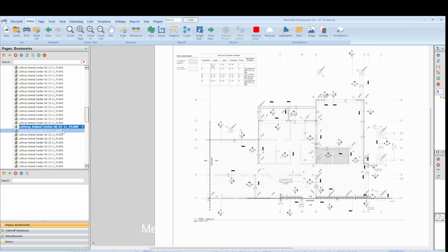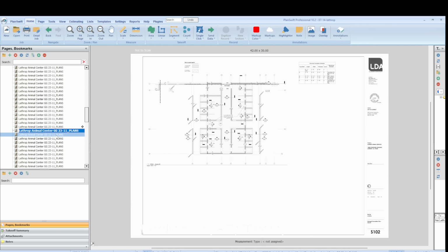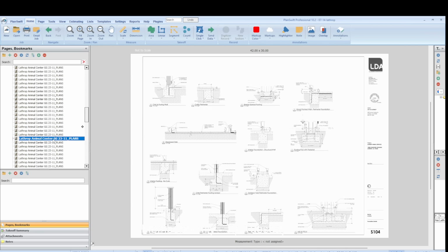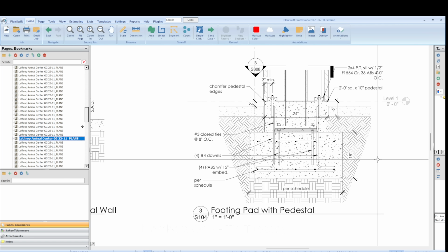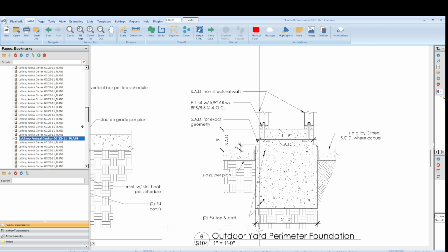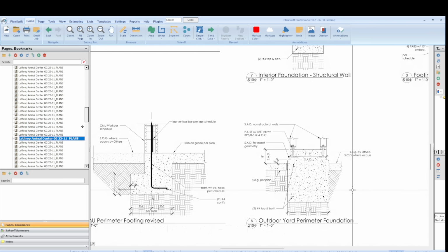All right, so what we want to do right now, see, remember we have a lot of sections because we had a big floor plan to break down. So here's a section view, the footing pad we just talked about. Okay, and so now you have your section views. Your section views give you everything you need in terms of the construction. Now, from your plan view, we measure how many linear feet of each of the walls that we have, each of the continuous footers we have.